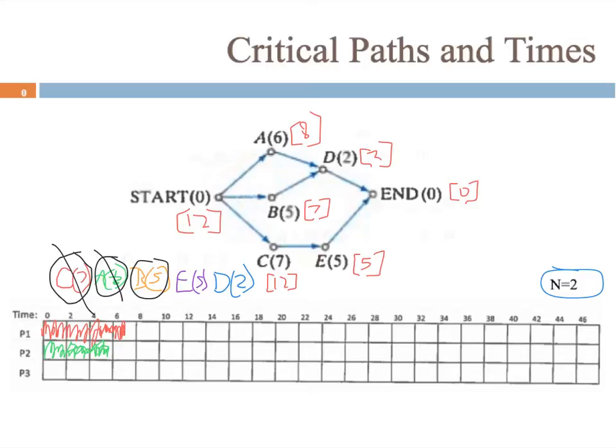So we only have 2 workers, so look at hour 6 where task A becomes complete. Now we can start task B while C is still being worked on by processor 1. So we'll start task B, and that will take us up to 11 hours. Alright, so task B is in execution. Now at hour 7, task C becomes complete, and we can move on.